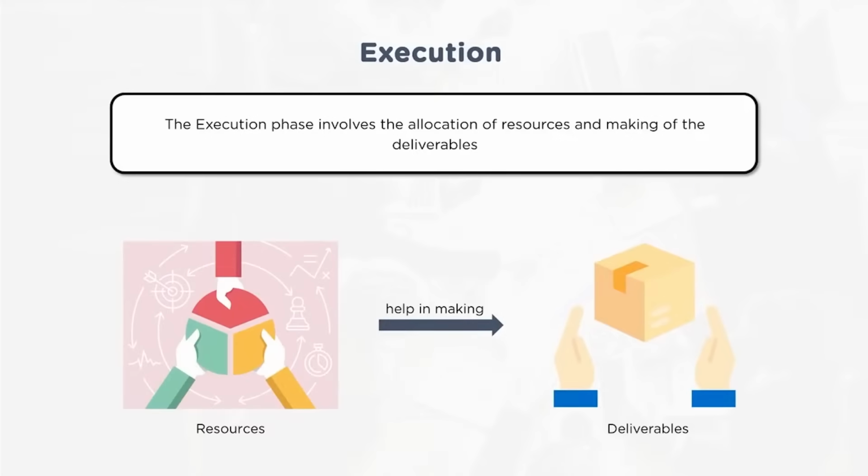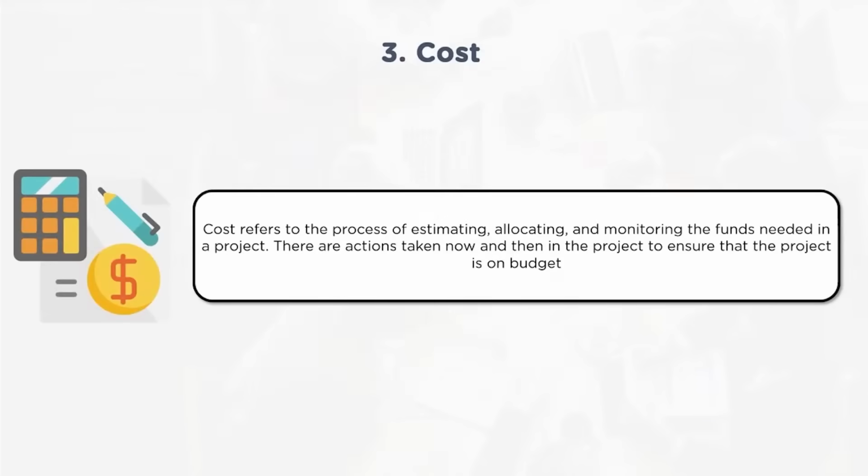So once this estimation and allocation of budget happens, that will become a base, and any deviations from that cannot happen so easily. Any deviations because of addition of scope can be handled through change management, but in an idealistic scenario, the cost should not escalate or come down. The organization can also set certain tolerances at the project level, considering various scenarios, like a scenario of risks, or something which deviated from the deliverable. To what extent it can deviate, that tolerance will also be set from the economic or monetary value perspective.